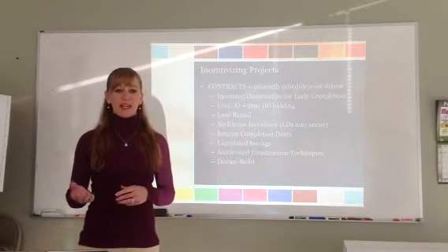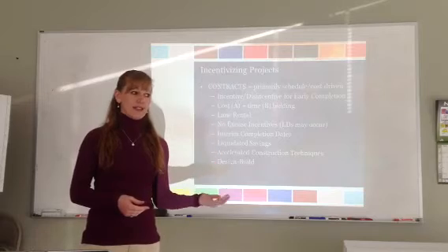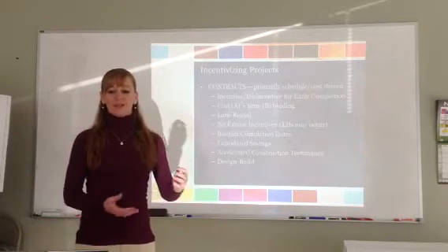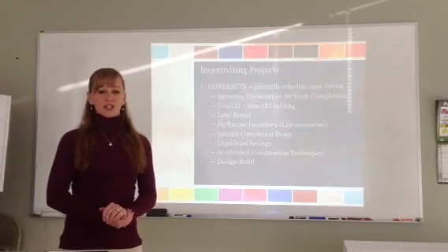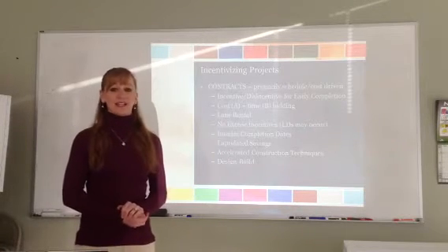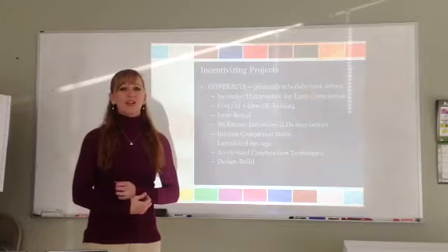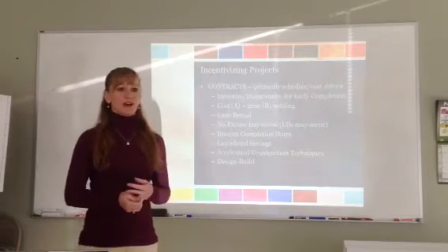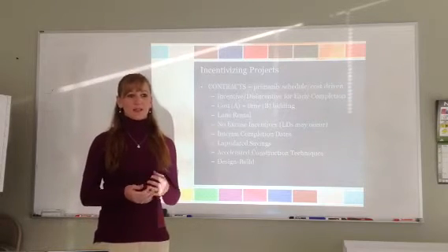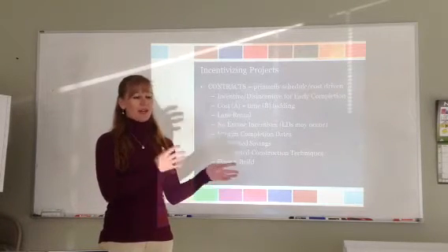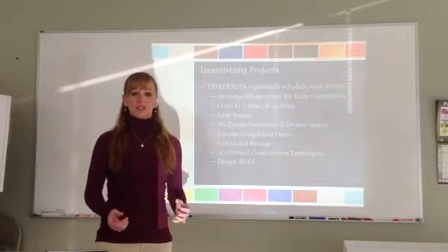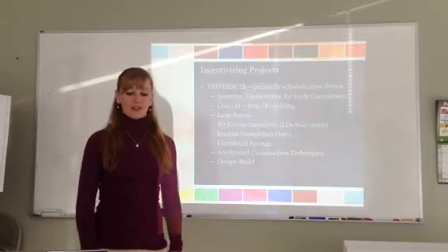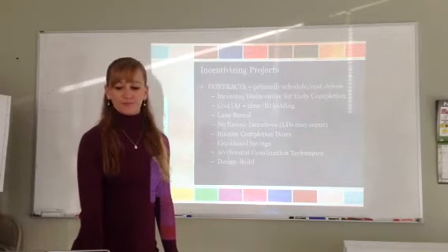Then there's liquidated savings, which are the same as liquidated damages, but the contractor is getting money instead of giving out money. And then we have accelerated construction techniques, which looks at more like lean construction and using precast systems instead of cast-in-place concrete, or developing all the mechanical systems and doing a lot of prefabrication in shop and then bringing them out to the job site, which in the end shortens the construction schedule. And then there's design build, which we've talked about before.